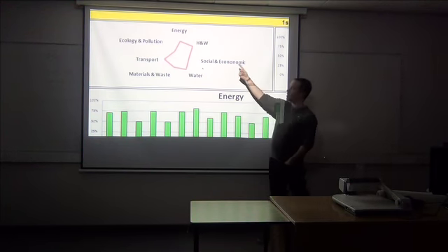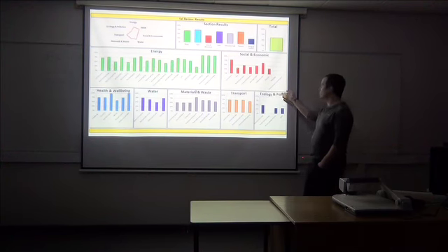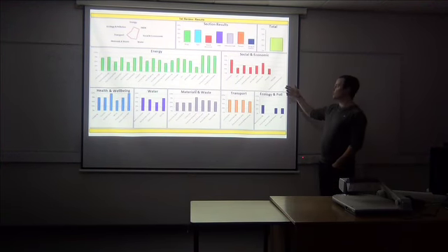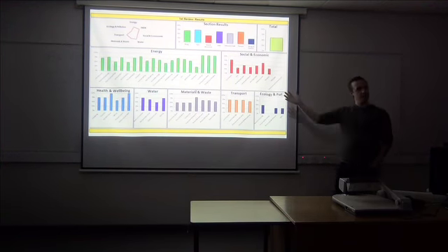And then this tool broke that down further. So in energy, we were looking at various indicators. So it might be energy efficiency, the amount of renewable energy used, for instance. We looked at socio-economic factors, whether or not we did post-occupancy evaluation, whether we did educational plans, etc., across all of these indicators. And the way that we used it was, we sat down with design teams, and they put forward their plans for what they wanted to do. We ran it through this tool and said, okay, based on what you say you're going to do, this is where our indicators sit. And then we could work with them and say, look, you're looking really good, you're doing a great job on your energy reduction and your water.